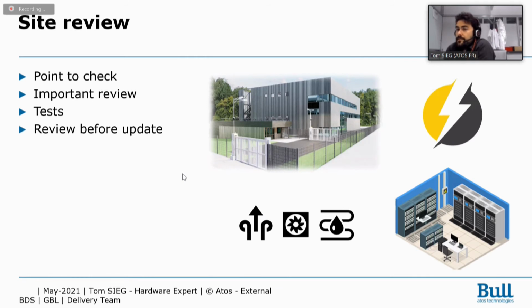So the first part is the site review. Check if the site and the room are ready to install a cluster. And yes, I forgot a little point. In some cases, you will be able to test each electric connector, each hydraulic connector, to be sure they work and they work correctly.